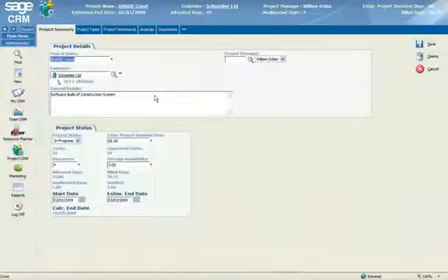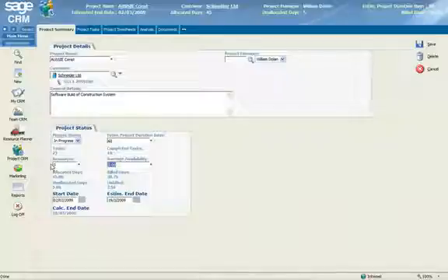When we do look at the project, you'll see areas which allow you to edit the details, and this is what we might call the management overview. So if you have an example of, say, 60 days or 50 days of a project, as a management overview, you can also say how many resources you may have available to run that project, and also an idea of average availability. This idea is from pragmatic project management. It's the way of estimating how many days per resource you have available per week against this project, and these give you concepts of how long something may take to actually render.